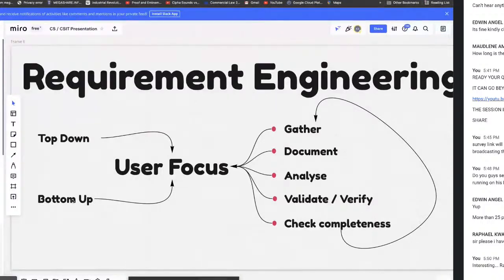So I was saying that for a top-down, you want to pick what the requirement is. There's an overall picture for the client to look at. Someone tells you he wants to build an Uber app. That's the app he wants. This is the top picture. You want to break down an Uber app. What does it entail? Whatever you've determined it entails, what do those also entail? That is to say that you are breaking it down from the top down.